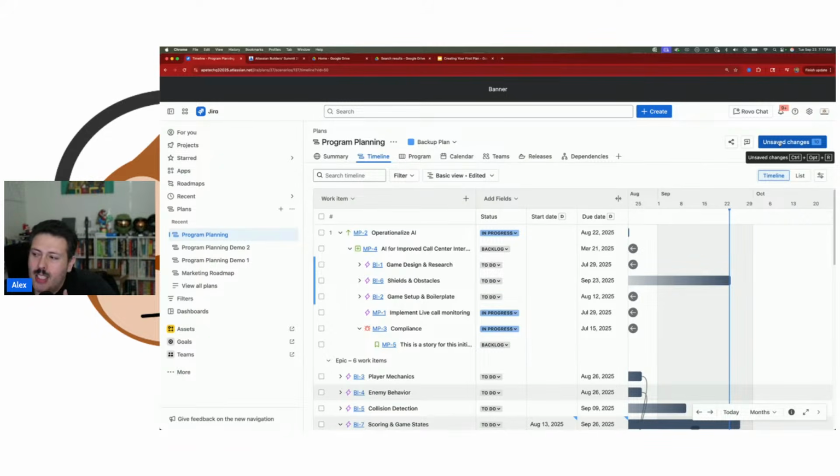My recommendation is I typically work off of a copy of the first plan, right? It's because I just want a carbon copy of what I have already, since it's data that I've organized, set up and configured to a certain degree. I've set it all up, and I just want to copy it because now I want to mess with it, right? I don't want to make any changes that impact the main plan. I want to make the changes here.